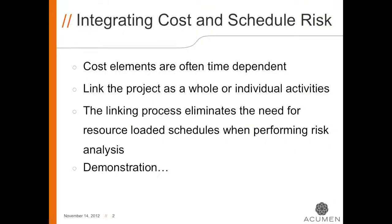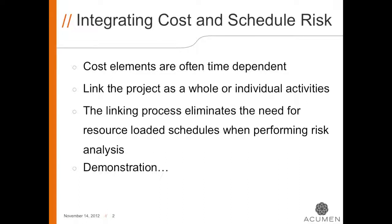First, the advantages of linking cost and schedule risk. Number one is that cost elements are often time dependent. This means that if an activity has schedule risk and the risk is realized, the activity will likely become more expensive than originally planned. We do realize that not all costs will increase if the schedule is extended.